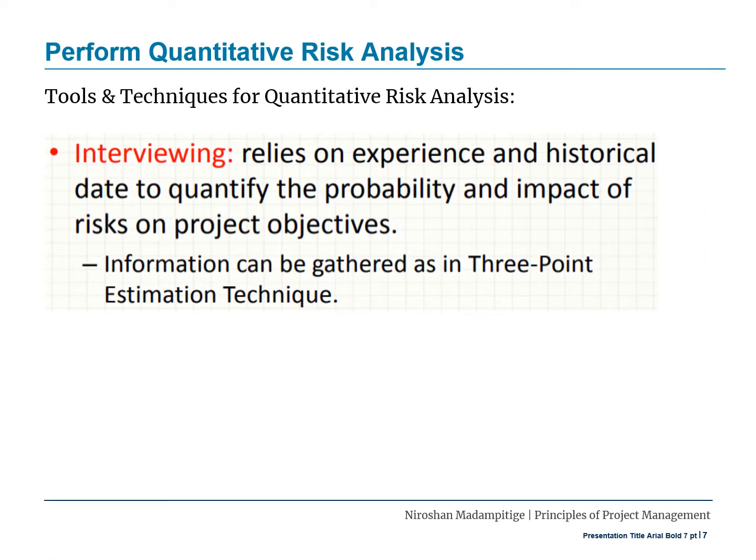Let's quickly have a look at what these tools and techniques mean in risk management. First, interviewing relies on experience and historical data to quantify the probability and impact of risks on project objectives. Information can be gathered as in the 3-point estimation technique.